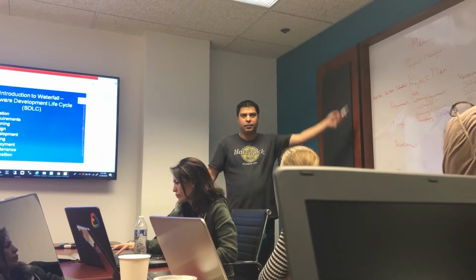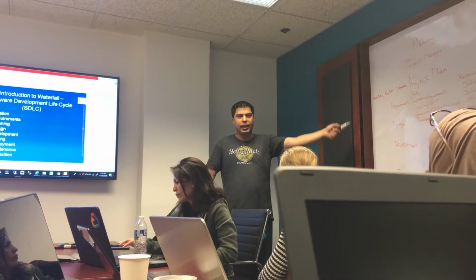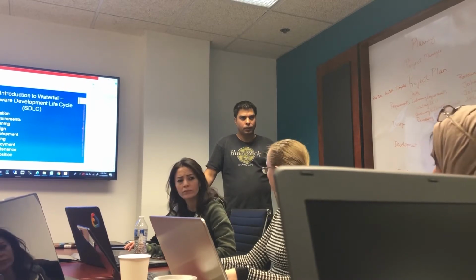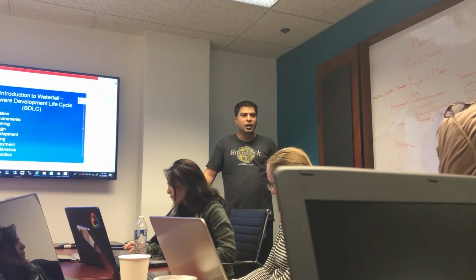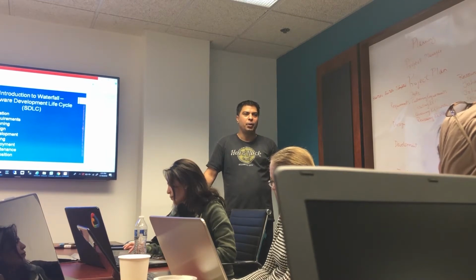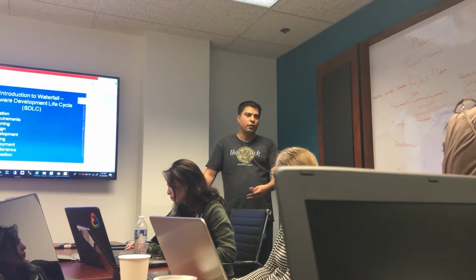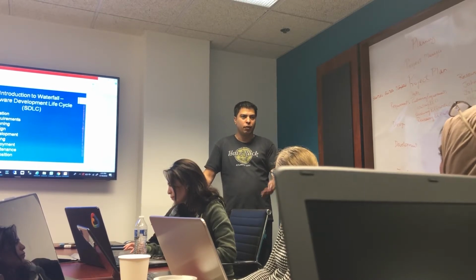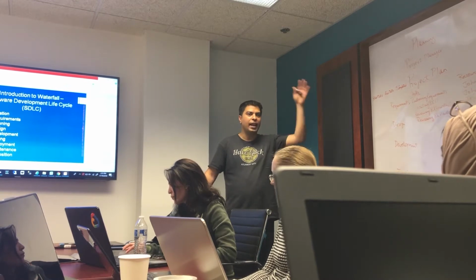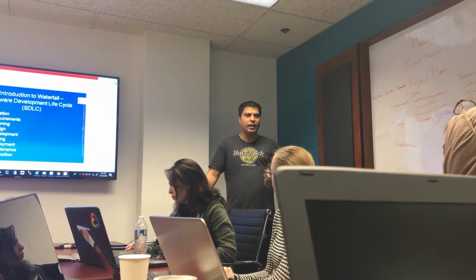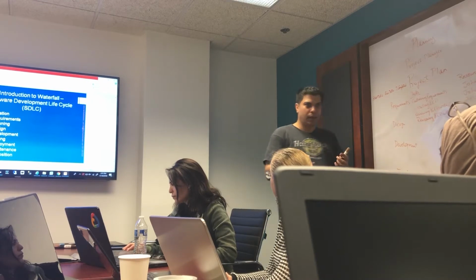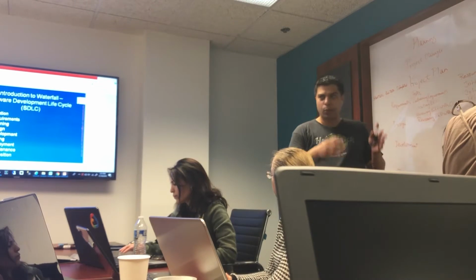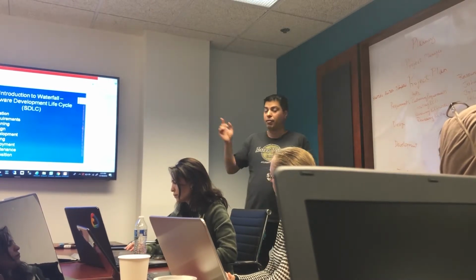Pretty straightforward thing, right? This is the planning phase. Initiation is the first handshake between the client and the boss of the IT team. The client tells them, this is a business reason, we need to build this software. This is what we want, high level. The VP understands what needs to be built. Says, based on my experience, I think this is the timeline and the cost, but this is an estimate, we'll give you everything after the planning phase.